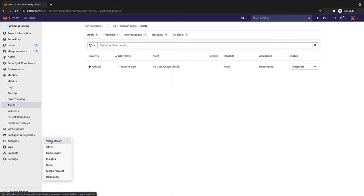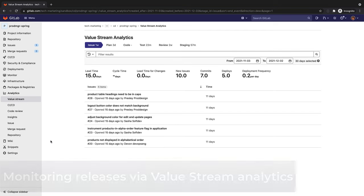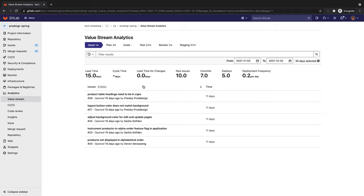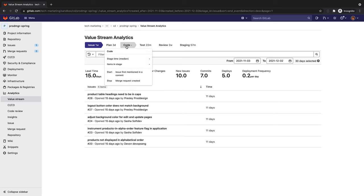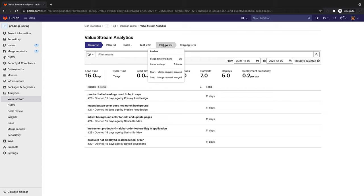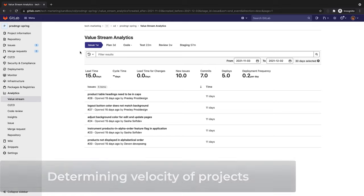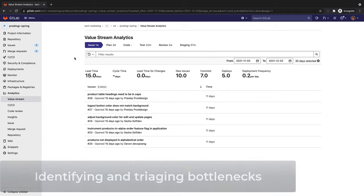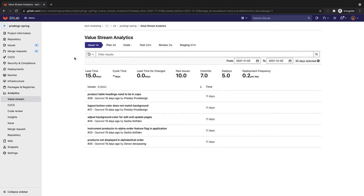In addition, Rachel can track and monitor the release progress through value stream analytics, where she can check her project or group statistics over time, and see how her team improves in lead time, cycle time, lead time for changes, number of new issues, commits, deploys, and deployment frequency. She can also check the median time spent in each stage defined in the process, such as issues, plan, code, test, review, and staging. Value stream analytics are useful in order to quickly determine the velocity of a given project or group. It points to bottlenecks in the development process, enabling management to uncover, triage, and identify the root cause of the slowdowns in the software development lifecycle.